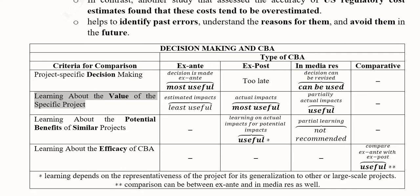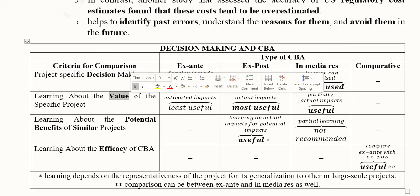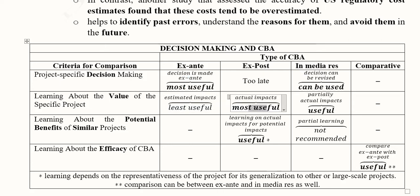The second criterion is learning about the value of a specific project. Ex-post analysis is most useful here because it provides actual impacts once the project is completed. Ex-ante analysis only provides estimated impacts. In Medias Res gives partially actual impacts and is also useful. Comparative CBA is not of much relevance for this criterion.